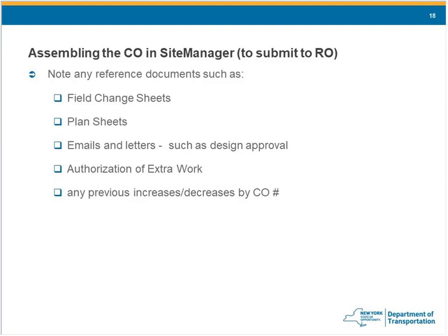If there's no cost impact, what I've always done is you just put it on your next routine change order. Routine change order that goes all the way to the OSC. It doesn't do any good to put it on a field change payment change order. But if it has no items associated with it, but you still need it incorporated into the project, you put it on your next routine change order that has full approval.